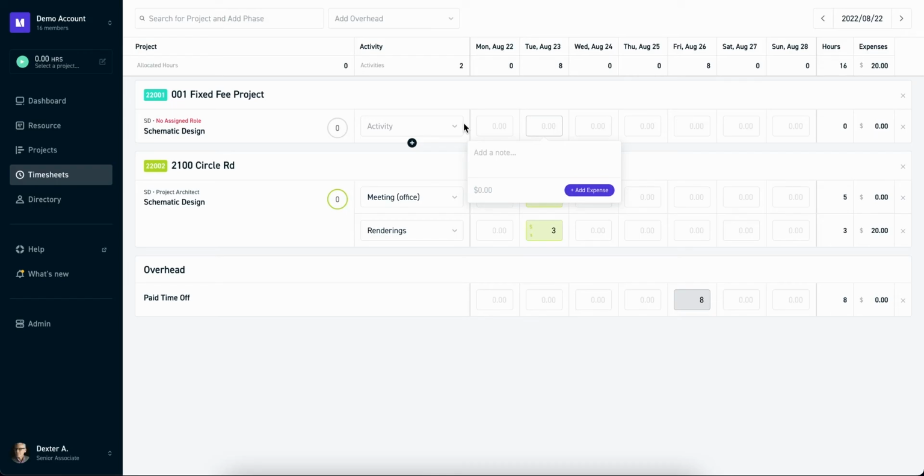Because you're not in the project planner, we won't know what your billable rate is. Without that information, we won't know how to weigh your time towards the project in terms of a dollar value and reflect it against the budget. No worries, Monograph is not going to block you from logging your time as we want to protect the integrity of your work. Just be sure to speak to an admin so that you can get added into the project planner.